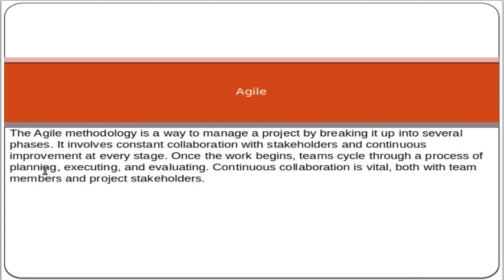The next approach is agile. Agile is based on an iterative approach — meaning development is done in multiple chunks. For example, if you have an e-commerce solution with 40 tasks, you take the first 10 tasks, do the planning, development, testing, and deployment, then take the next 10, and so on until all 40 tasks are complete.